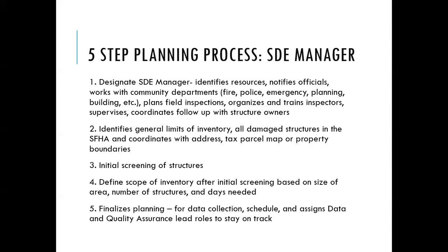And then the ones you're not sure about, that are between like the 35 and 65 range, are going to be your top priority to start with. You don't really need to do a full assessment if it's obviously substantially damaged. Then you can just document that and record it and get that determination out as quickly as possible. But you're really going to want to start with those medium damaged and really take a closer look at those